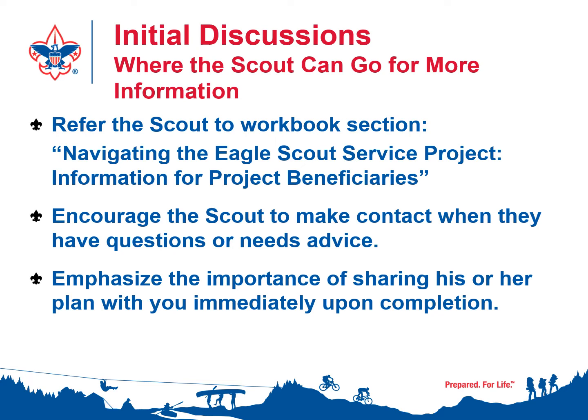Encourage the scout to call you if he has any questions or needs advice before he makes radical changes to his project, for example. He probably should touch base with you, things like that. How to handle changes. As long as we're talking about changes, life happens and things can change. If there is a substantial change, a major change to the project, then the scout should go back to whoever approved the project and get an authorization from that person in writing, email or something, that says, yeah, we discussed the change and the change is okay.